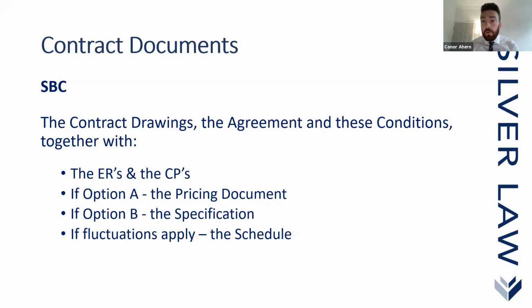It's actually a very important area at the moment, considering the levels of inflation that we're experiencing, particularly in relation to construction activities. Obviously, from an employer's point of view, he doesn't want to have to deal with the increased cost that would arise through the fluctuation clauses. It's difficult for the contractor, but most contracts would say that the rates are fixed for the duration of the contract.